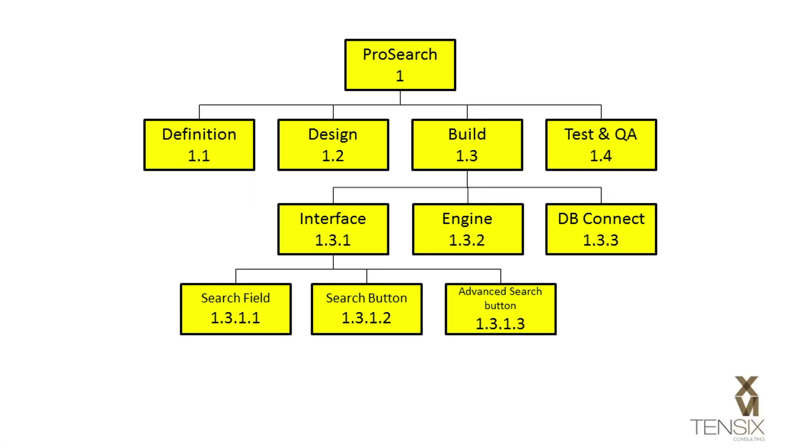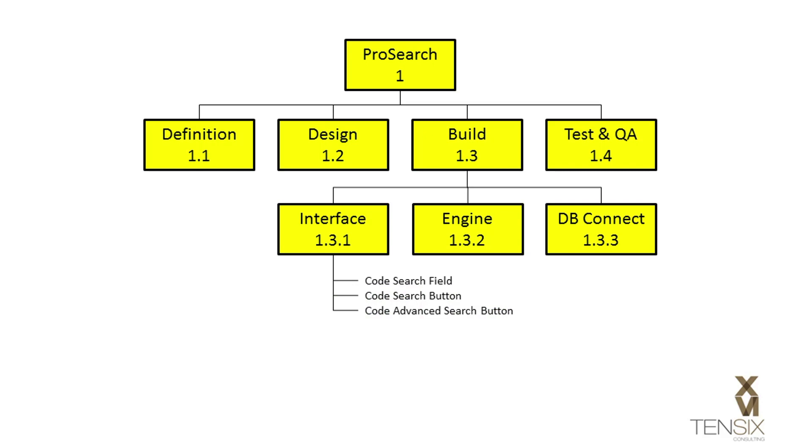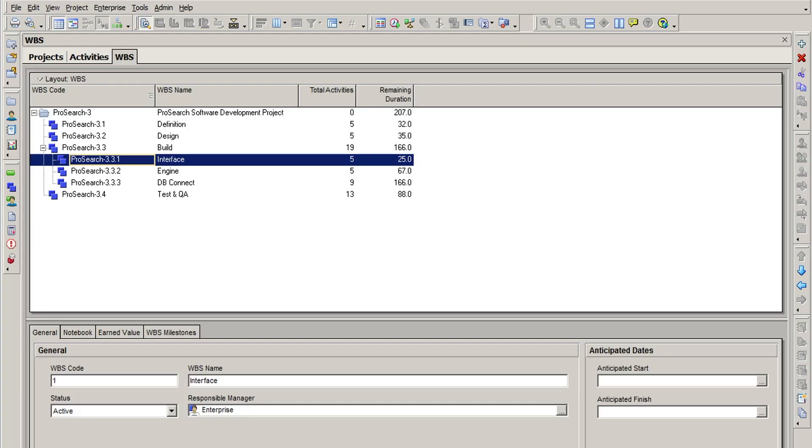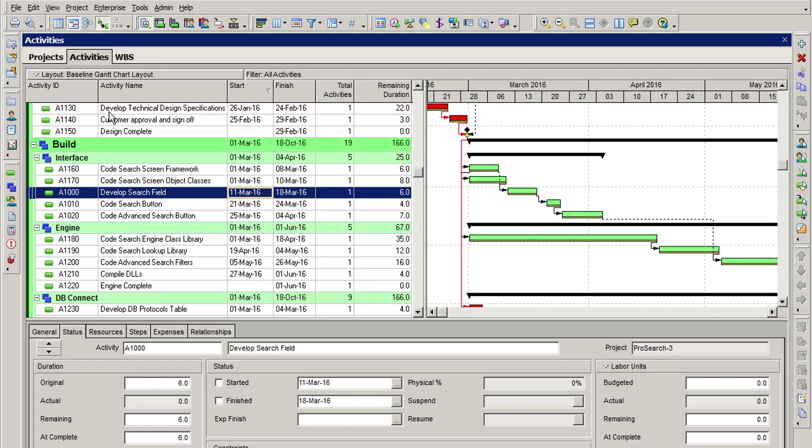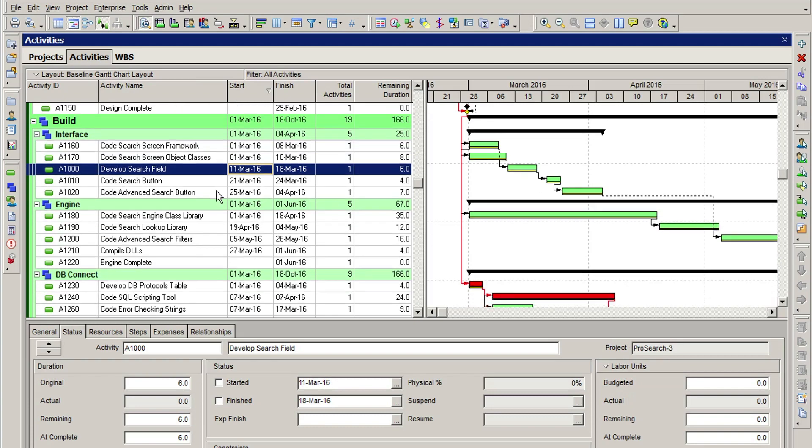Therefore, it would be more appropriate to represent these items as activities in the schedule below the interface element, and leave it at that. This will keep the WBS more balanced, and at a level of summarization that will be of greater value to the project team.